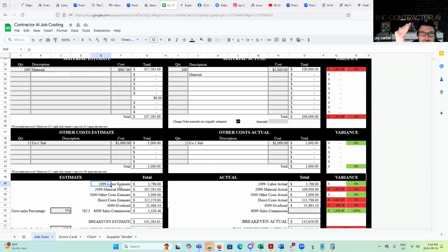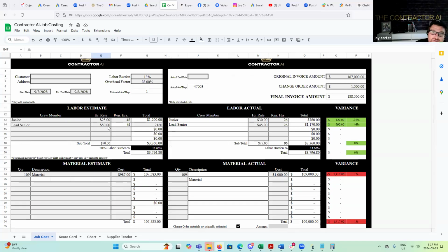And always get him to invoice you, and you approve that invoice. Do not, under any circumstances, just pay him a check out of your bank account without an invoice and without a subcontractor agreement. Everywhere in North America, they'll come in, do an audit on you, and determine that he was in fact an employee.